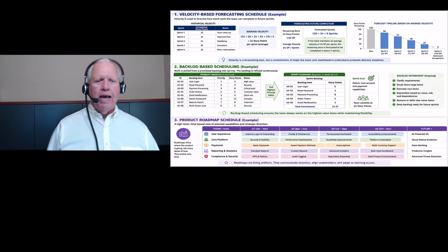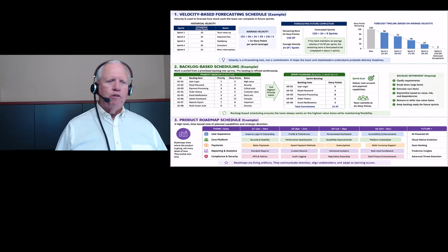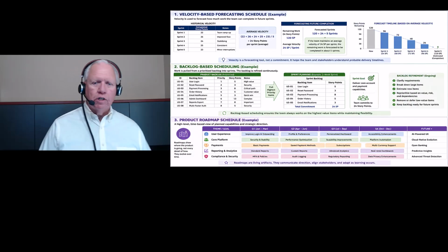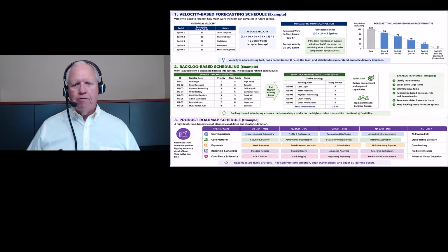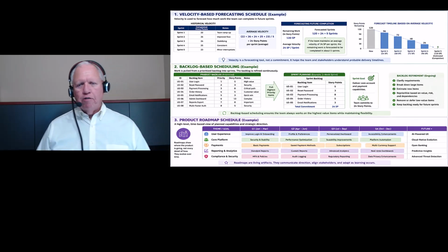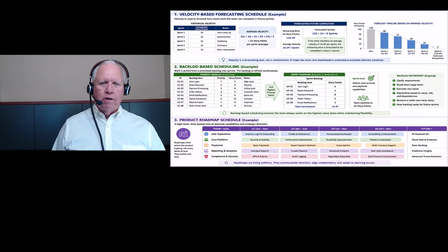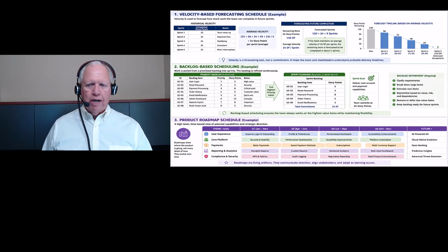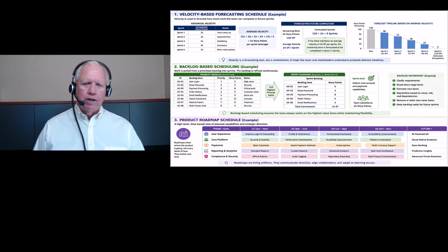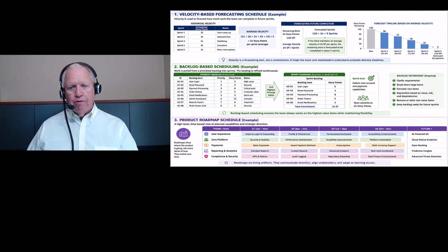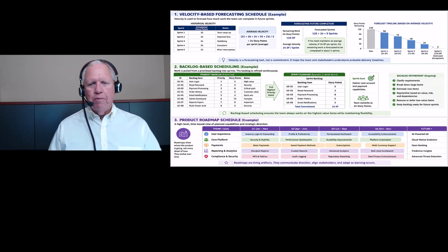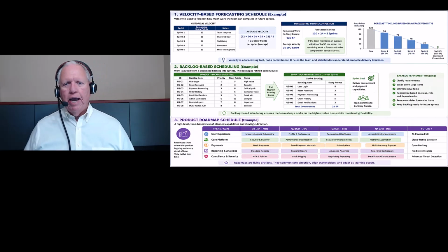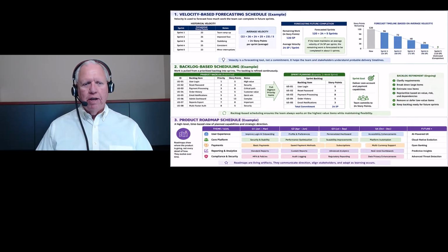This is part of Agile as well, because you're looking at the product backlog. The product owner controls the product backlog and ranks it from highest priority to least priority, and then it's broken down into a sprint backlog or an iteration backlog, and the team works with the product owner for that. And then what happens is you decide these are the features or these are the story points we're going to be doing for the sprint backlog. And after everyone agrees, that sprint will then be started, and you do a 3-week sprint.